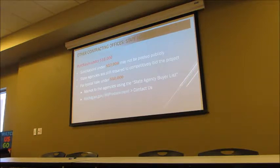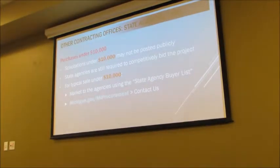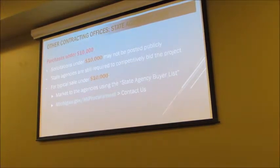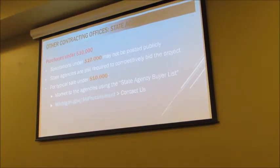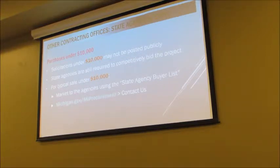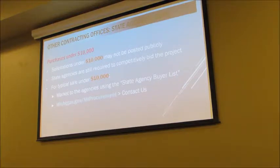And say, hey, I'm interested in the lower dollar opportunities, because they still have to bid it, they don't have to post it, they have to go get 3 quotes. And can I get in your Rolodex, so to speak, or can I give you my information? Now, it's not to say they're not allowed to post them. They may say, I post everything. I know DNR posted, even if it's not required, they're going to use the system.